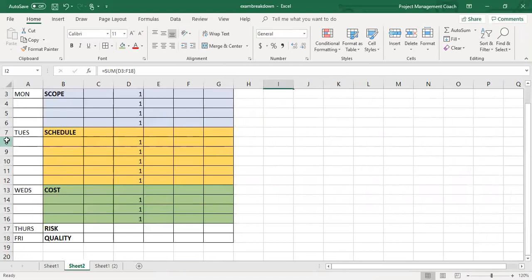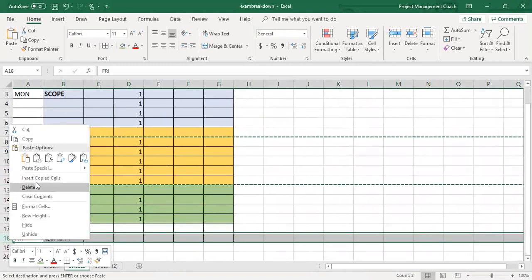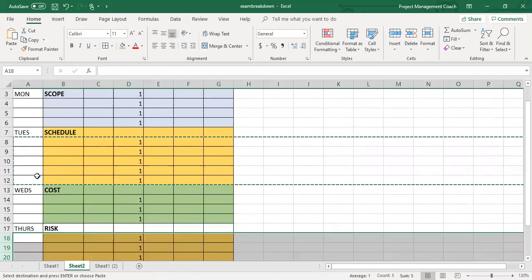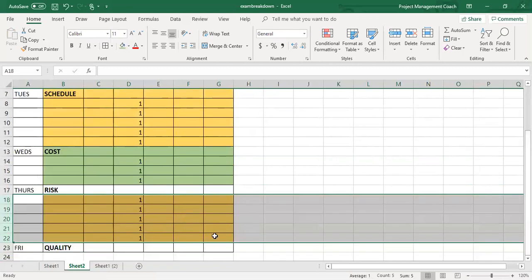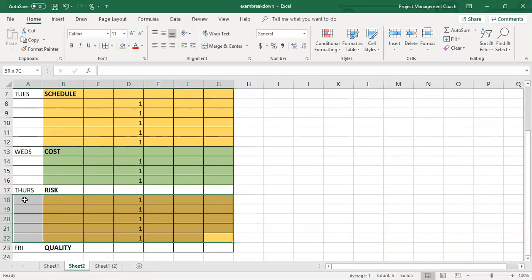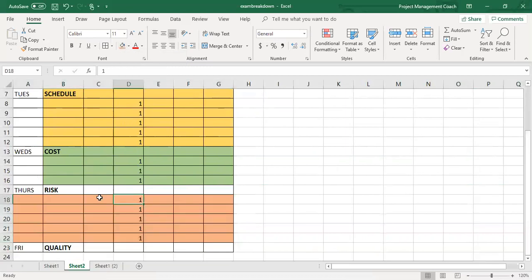Now, in the area of risk, we've got 5, I beg your pardon, in planning. 5 in planning. So it's a bit similar to schedule. We've got plan risk management, identify risks, perform qualitative risk analysis, perform quantitative risk analysis, and then plan risk responses.